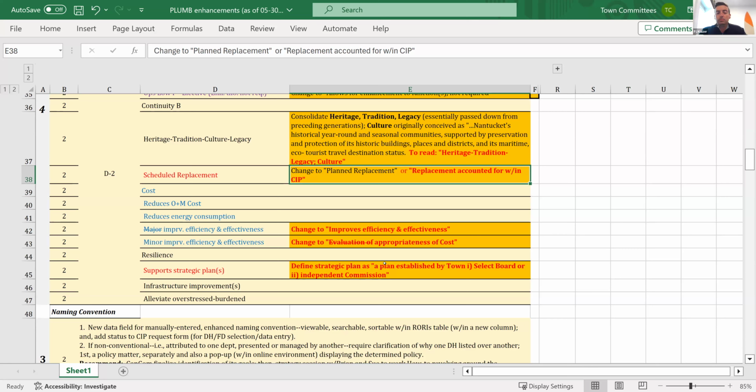So it may be a new request, it may be a new request to us, but it was already submitted in the SIP. Like it's submitted to finance. So we may say, hey, on this one, one of the pieces of supplemental data may be the department submitting their schedule of replacements, including this vehicle. And therefore it's part of the consideration of the SIP plan by finance and the spreadsheet in the 5-year outlook.